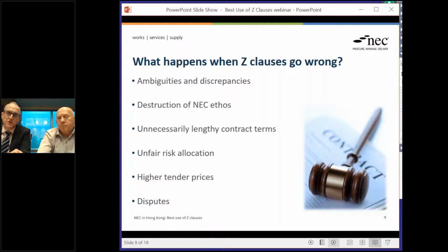But one amendment that you see quite often in the UK, and it's also used in Hong Kong, is to change the way that you value variations, which under NEC, of course, is to say you look at the effect on cost, and then the contractor gets cost and their tendered fee on top, which is all about trying to create a neutral entitlement where people aren't held to under-tendered prices, high or low, exactly. And they get a pre-agreed profit and overhead on top. That is often amended